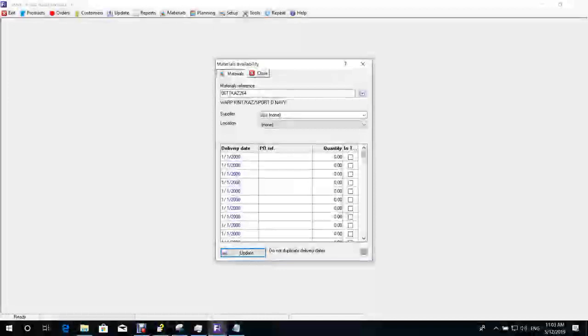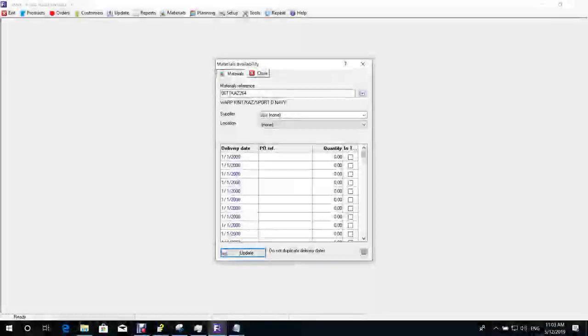So when you create an order in the system, it will read all the materials in your bill of materials, and it will read as well the lead time against that material. It will show you, like Jake showed you when we were back in the UK in the system walkthrough, the worst case scenario. It will show you whether the material is available, in stock, or is expected to be delivered. It's going to show you all that information if you add a lead time against the material in the system.